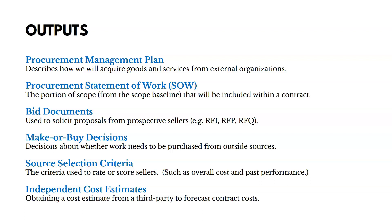There are several outputs of Plan Procurement Management. The Procurement Management Plan documents how we're going to get the goods and services we need from external organizations. Then there's the Procurement Statement of Work — the portion of scope from the scope baseline that will be included within a contract. We determine what we need a procurement for, pull those items from the scope baseline, and they go into our Procurement Statement of Work. Then there are Bid Documents, used to provide information to suppliers. These include a Request for Information (RFI), a Request for Proposal (RFP), or a Request for Quotation (RFQ) — documents sent to prospective sellers to get their feedback on products they can provide and at what price.